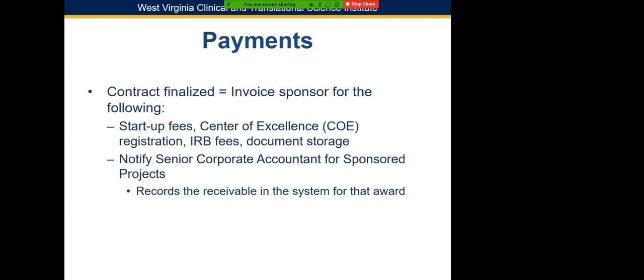Once the contract is finalized, you will be invoicing the sponsor. You want to go ahead and get your startup fees, your Center of Excellence registration fee, IRB fees, document storage. That way, whenever you do get an invoice, you can go ahead and pay that and the award will be set up. You can also notify the senior corporate accountant for sponsored projects. He will then post it in the accounts receivable so we know what we are waiting for.